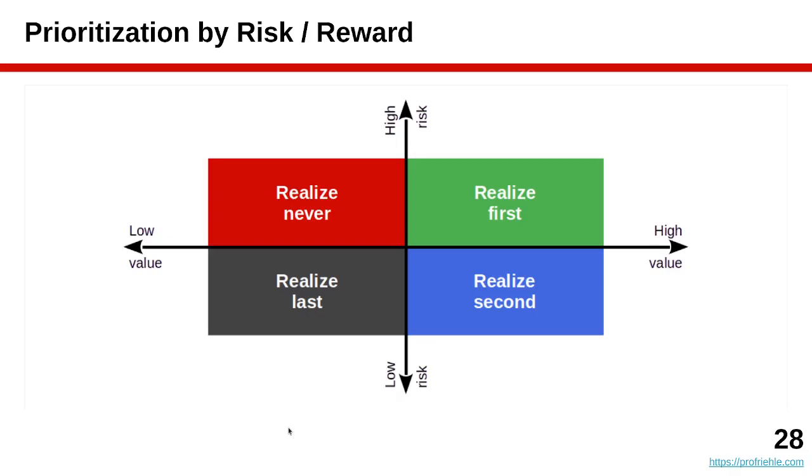And here's an interesting observation. Most will get it wrong, but as you look at your features, and I'm simplifying here with a binary distinction, high value, low value, as you recognize something is of high value, people will often be tempted to do first what can be done easily and do second what is hard or risky to do. And that's exactly wrong. As you sort your items in the product backlog, you should always put the high value items to the top if they can be done and the dependencies have been done already. But then you should pull forward and do earlier what is risky, and what you feel certain and is easy to do should come after that.